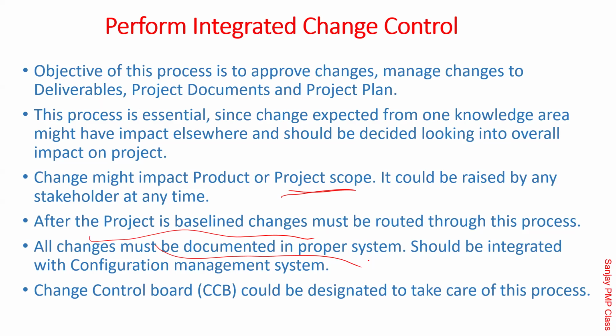After that, it goes to the change manager for approval. Once the change manager approves, it does not get accepted. It becomes an acceptance backlog for the change advisory board. So next time, whenever the change advisory board is meeting, all the changes approved by the change manager will come there. Before that, the change manager needs to also do the impact analysis and write his comment.